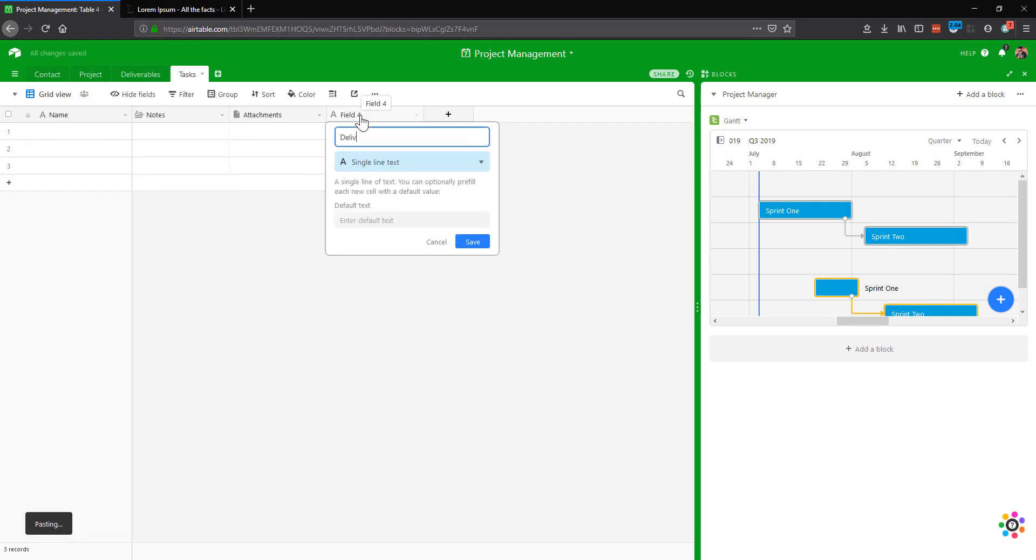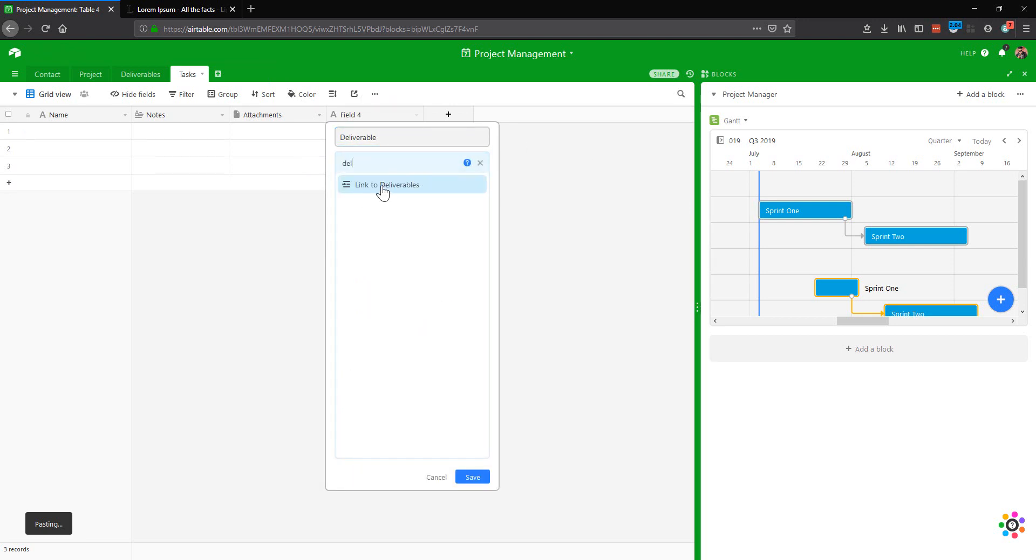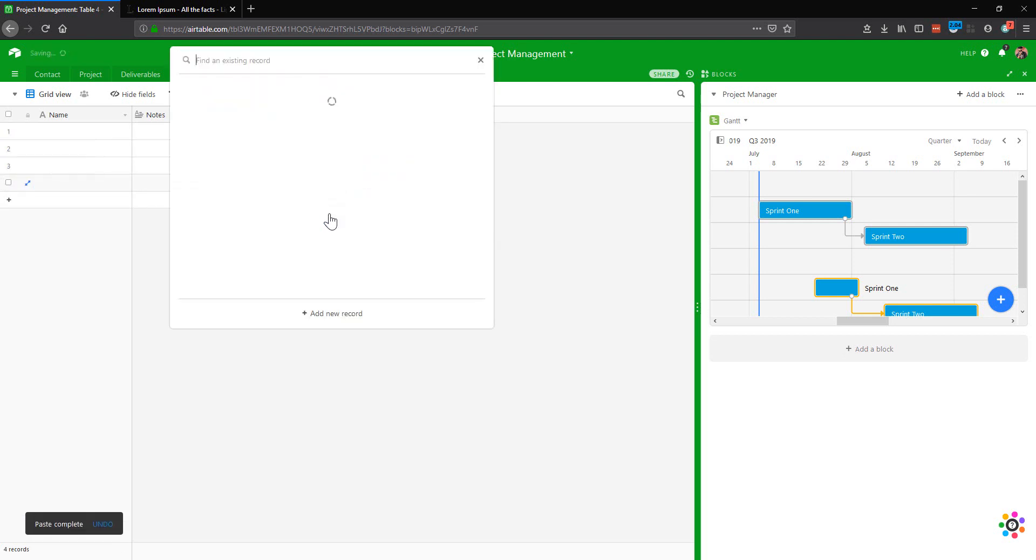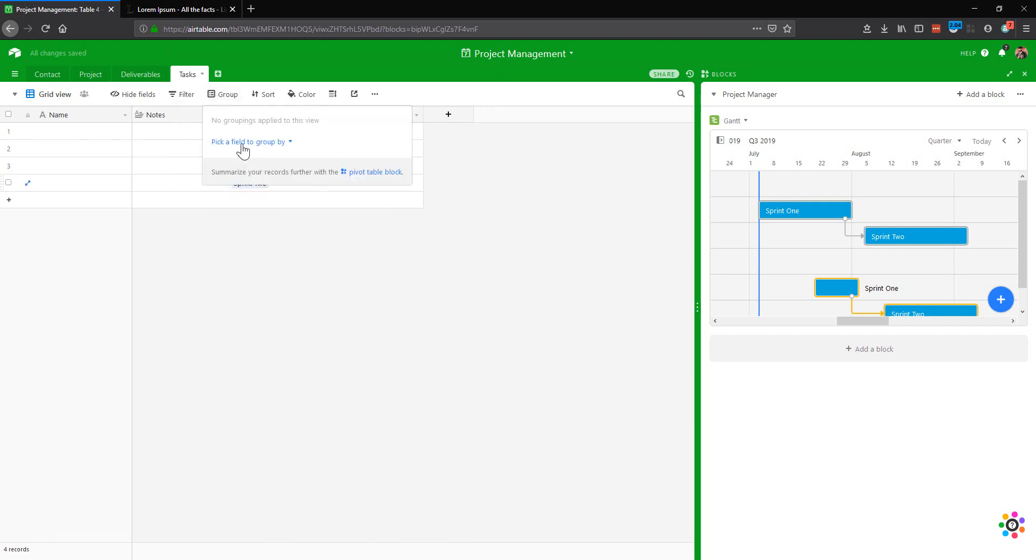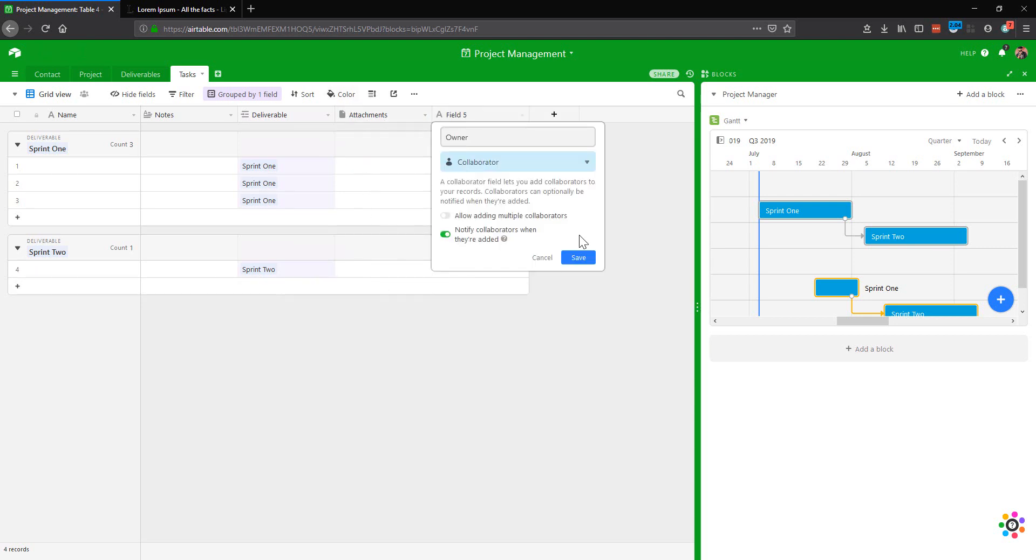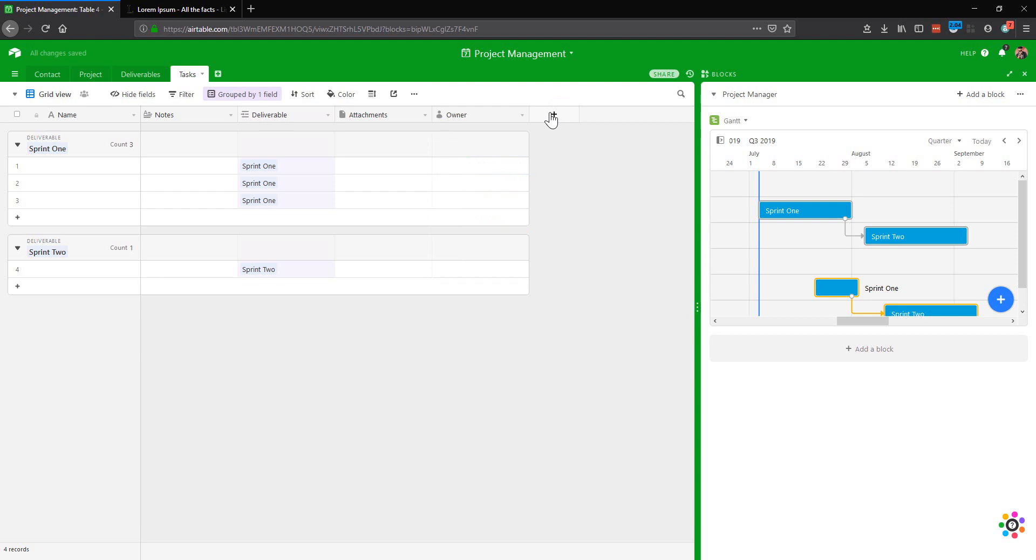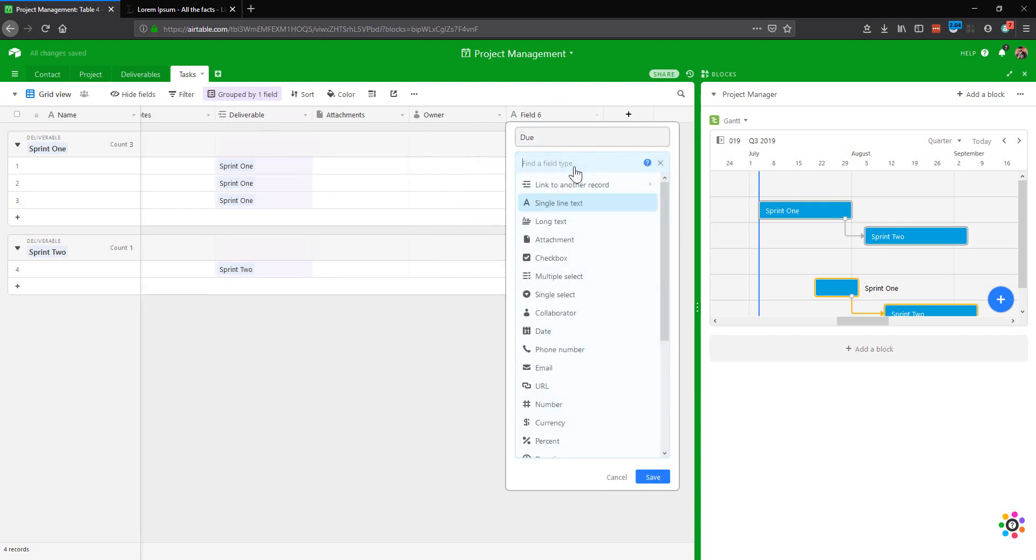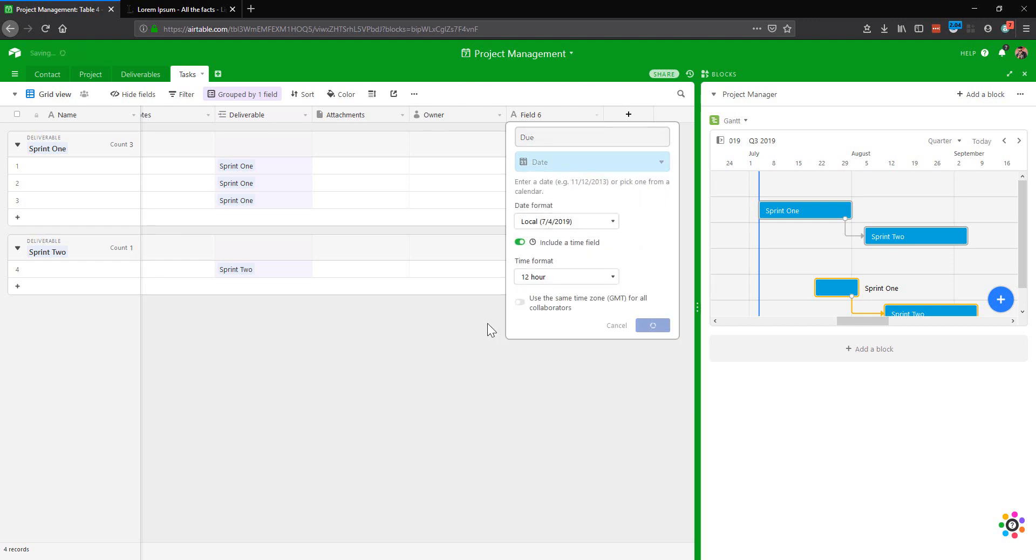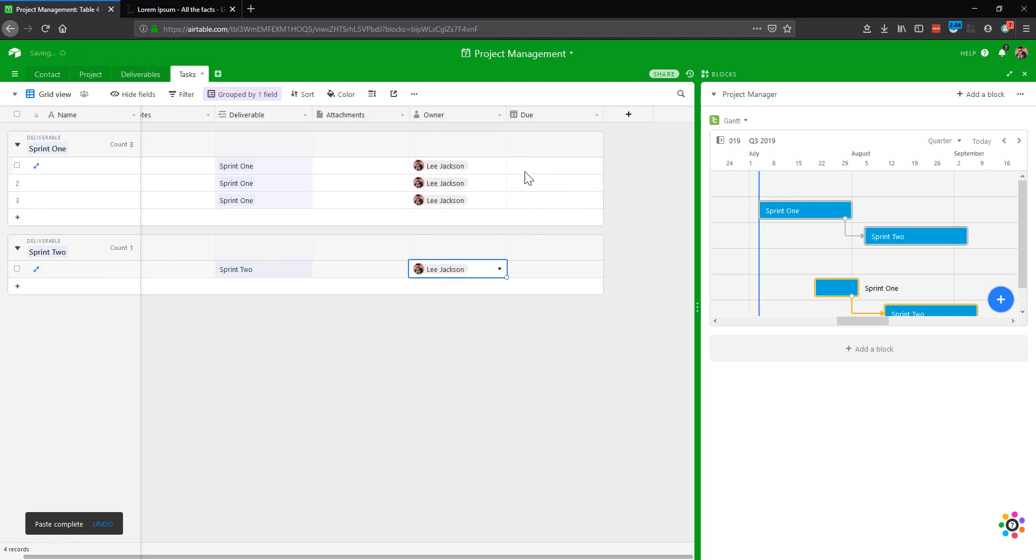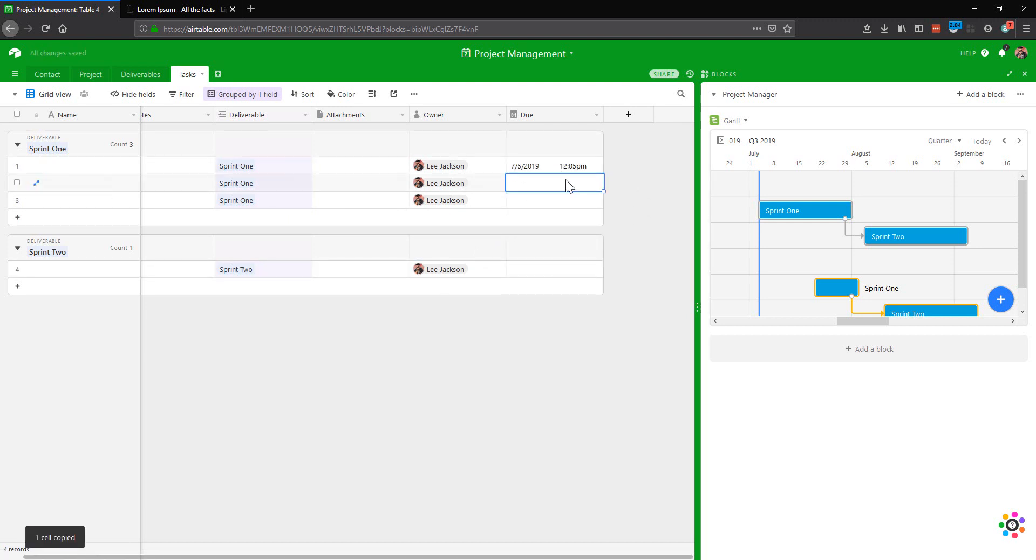So let's add in some tasks. We're going to link this up to the deliverable so we understand where we are in the overall cycle. And then let's actually link this to the web build project sprint one. Let's also link one up to sprint two so that we can see that. We'll move attachments over here because that's actually going to be useful as is notes. We want to group this by deliverable as well so that we can see what's going on. So that's our collaborator. We want to notify them when they are assigned a task. We want to tell them when it is due. So let's do a date. You could even do a date time as well if you wanted to, if it was due for a particular time.